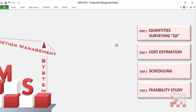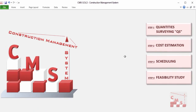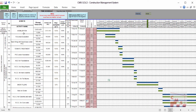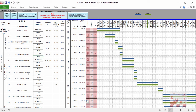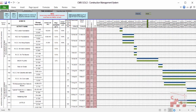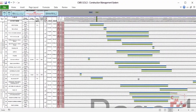For CMS Gold, further to quantity surveying and cost estimation, CMS can automatically provide a time schedule and feasibility study. After CMS calculates the budget and detailed price for each activity, using the logic sequence between all activities and common productivities for each manpower type, CMS will automatically develop a time schedule — showing all activities with planned values, weightage against project value, duration required, and planned start and planned finish for each activity — and produce a bar chart for the full project.